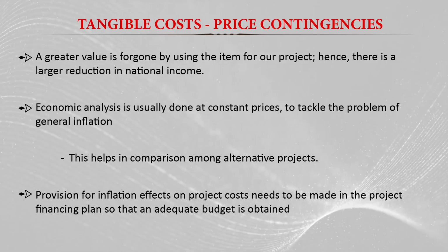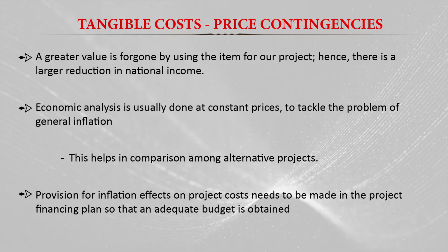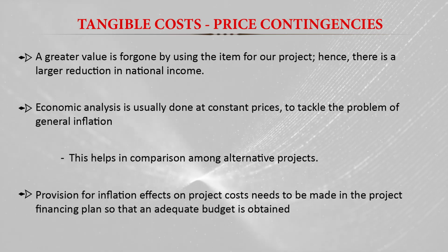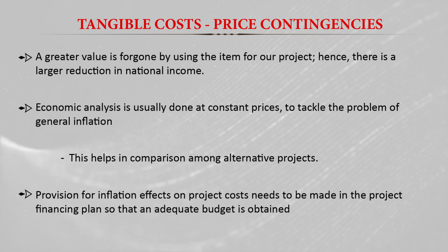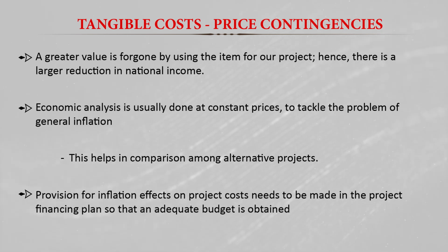So actually we need to make the provision of the inflation in the budget itself, so there is no problem while implementing the project. So many times we have heard that when there is a delay in the project implementation, the cost of that project increases because there is an inflation effect on the project cost. And tax is another example of the tangible cost.